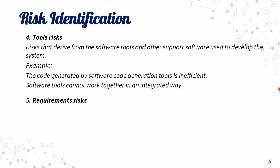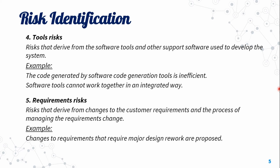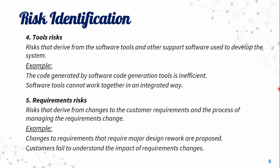Requirements risks are risks that derive from changes to the customer requirements and the process of managing those requirements. For example, changes to requirements that require major design reorganization are proposed, or the customer fails to understand the impact of requirements changes.